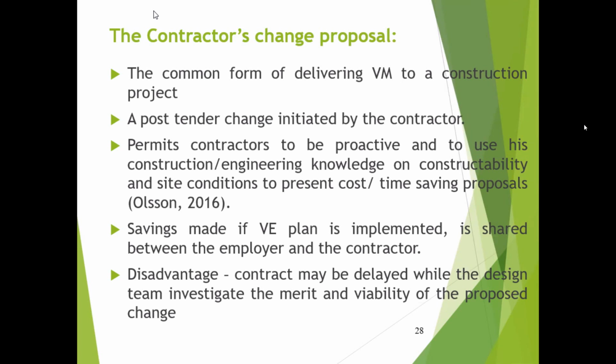Okay. And suppose due to their proposals a saving is made, then it is shared between the employer and the contractor. But on the other hand, there is a feeling or concern that this kind of proposal that the contractors bring in may cause delays.